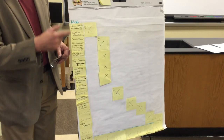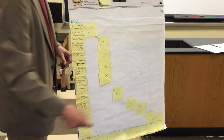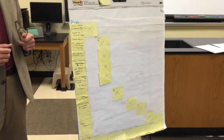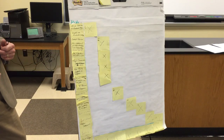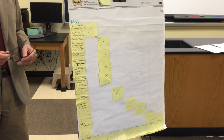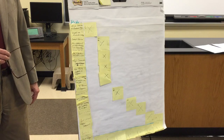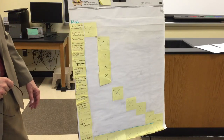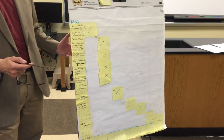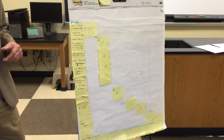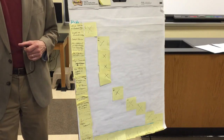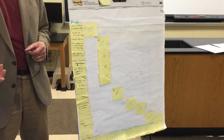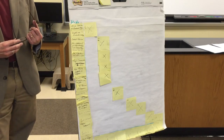From the beginning of your project to the end of the project. So how can you involve a group? Here's one method: do an old-fashioned poster board and Post-it Gantt chart. And if you have a computer whiz there, have them put all this on Excel as you do it. Does this make sense? Have you ever thought — I know some of you that had my class did these on your own — but did you ever think of using this with a focus group or a problem-solving group? It's a great tool. It's a great way to get people thinking.